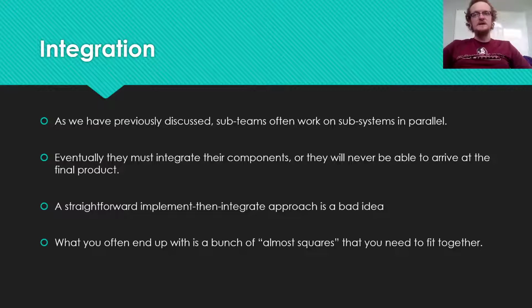And if you've ever laid tile, not all of the tiles are going to be perfectly square, and the less conversation or communication you have between your subsystem teams, the more those pieces of software won't actually line up correctly together. And so what you end up with is a situation where you have to go back potentially into 2 or 3 or 4 or 5 of these subsystems and start making changes that could then ripple to other subsystems in order to actually line them up correctly.